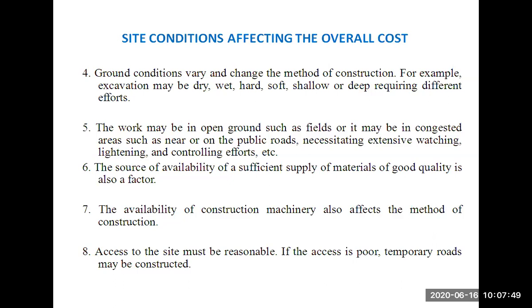If the machinery is taken on rent, it will increase the overall cost of the project, because the contractor is not having his own machineries. He is going to take them on lease or on rent, and definitely he will charge extra for that. But if he has his own machinery, there is a chance of some bargaining in that case, and it will affect the project cost.